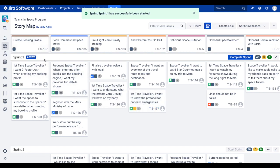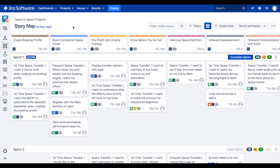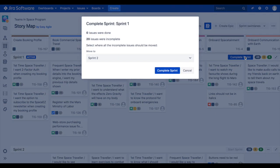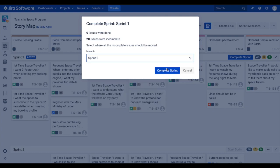Teams also have the ability to complete their sprints without leaving the story map. To complete an active sprint, click on the blue Complete Sprint button at the end of the active sprint swim lane. You will now see an overview of the status of issues in your sprint. Under the Move To heading, select where incomplete issues should be moved to. Then click Complete Sprint.